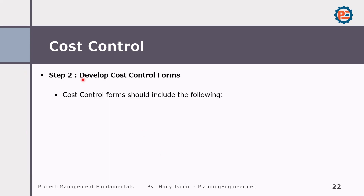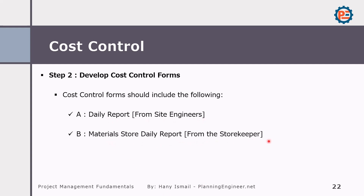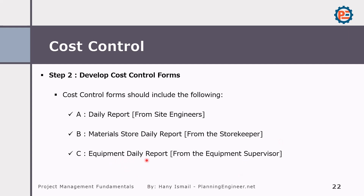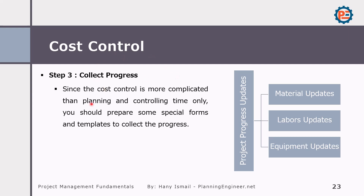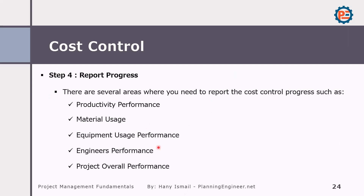Developing cost control forms should fit the baseline we created. We need daily reports from site engineers, a material store daily report to track material usage, and an equipment daily report. Collecting progress gives us the opportunity to evaluate the actual work and compare it to our baseline. After collecting progress, we can create reports on productivity performance, material usage, and equipment usage.